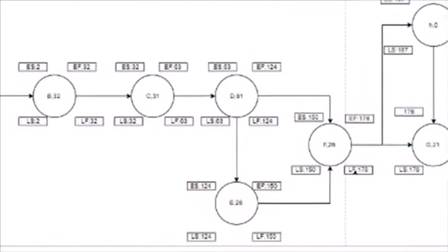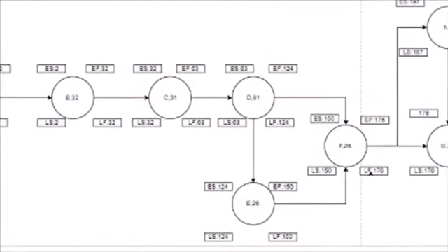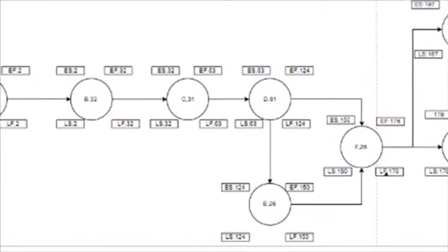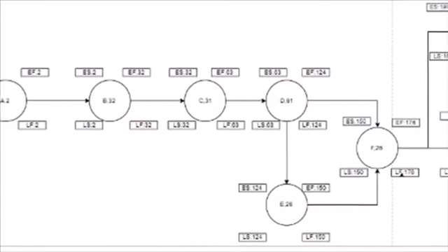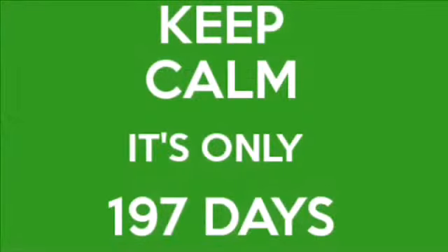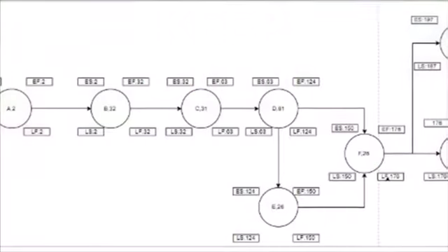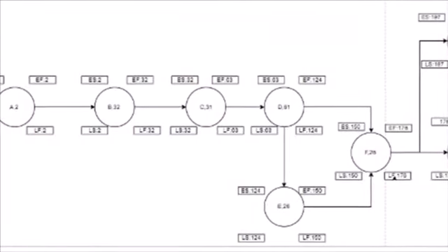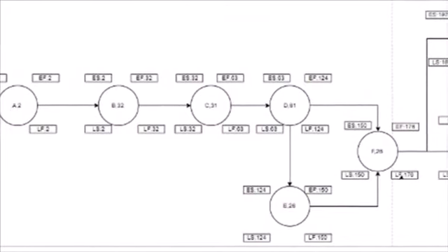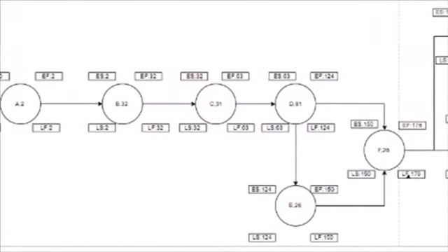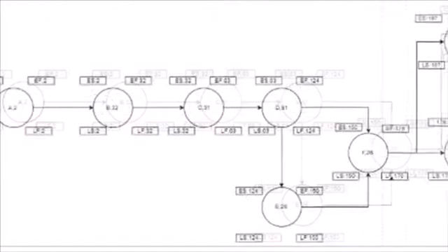Performing AON analysis, the free float and the total float of all activities are 0. According to the calculations, the duration of our project is 197 days. The critical path is 1 in our project, which is A, B, C, D, E, F,